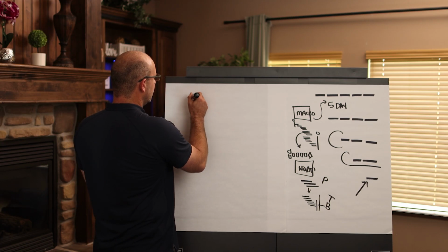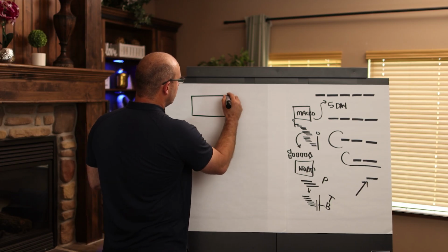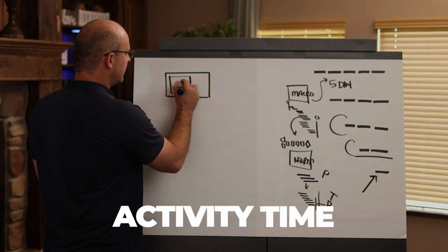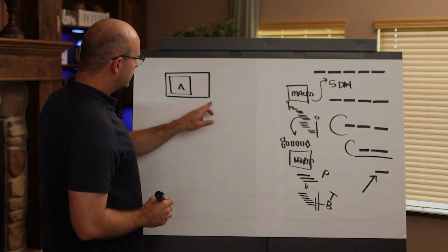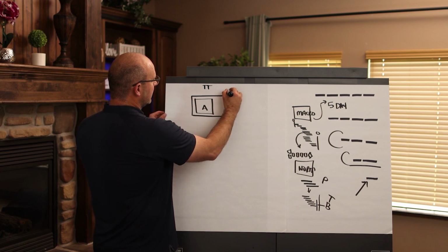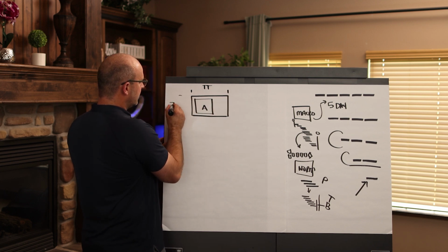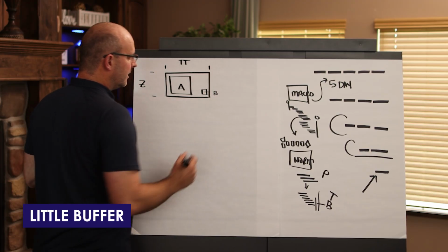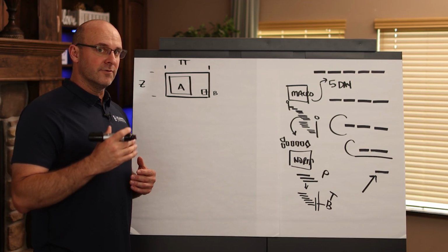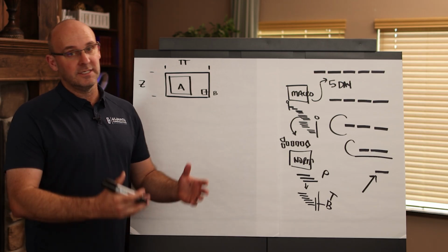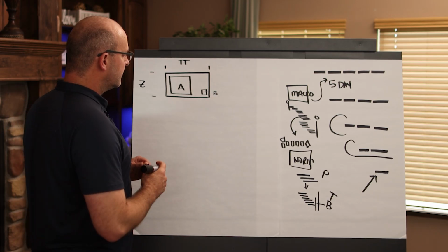So when I think about the lesson learned from Kingman's formula, basically what we understand is that typically in construction, there's the activity time for something, and the overall time that it takes, that's what I call an in-zone cycle time. It's the overall time, not just how long the activity takes. And let's just use the example of takt time, right? That's the time you had, and this is within a zone, right? And this is the amount of work, right? Typically, you should have a nice little buffer in here, and buffers at the end of an activity are great to finish work, clean up, reflect, work in one piece, one process flow, train your workers, demobilize, finish your inspections, right? It's a great opportunity.